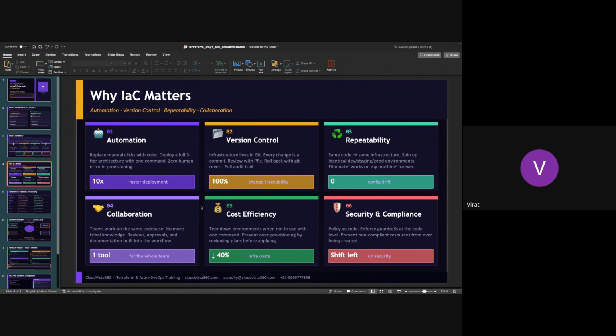Once everyone gives their time, which is hidden, then everyone's time will be opened in front of everyone. The scrum master will ask about the very unrealistic time, like someone gave 20 hours. They will ask, hey, how do you think it will be done in 20 hours? Why do you think so? If he has a very logical reason, then 20 hours will be assigned. If not, then the nearby team estimates, you are saying 80 hours, someone is saying 60, someone is saying 50, someone is saying 70.